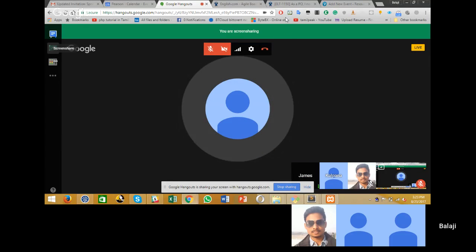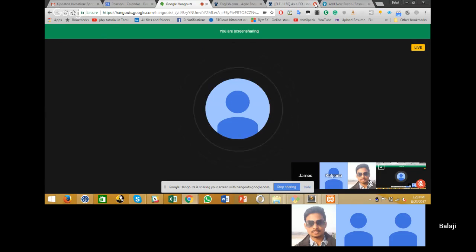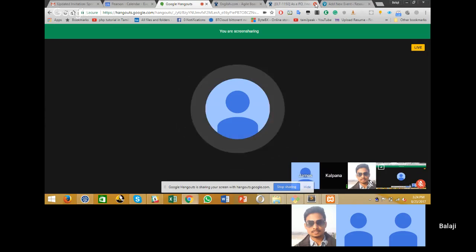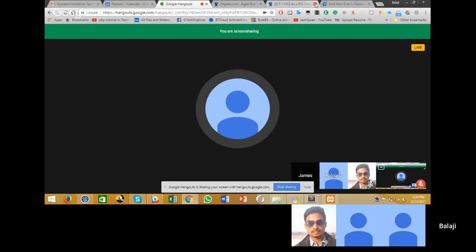Okay, so we can work out the exact date, perhaps in email, but obviously we need more than a day to get that to you. So if you give us that information on Monday, hopefully we will have 2 weeks of time to get you the PSD so that it's ready for you for Sprint 76. Yes. Okay. That works. That makes more sense. Okay.